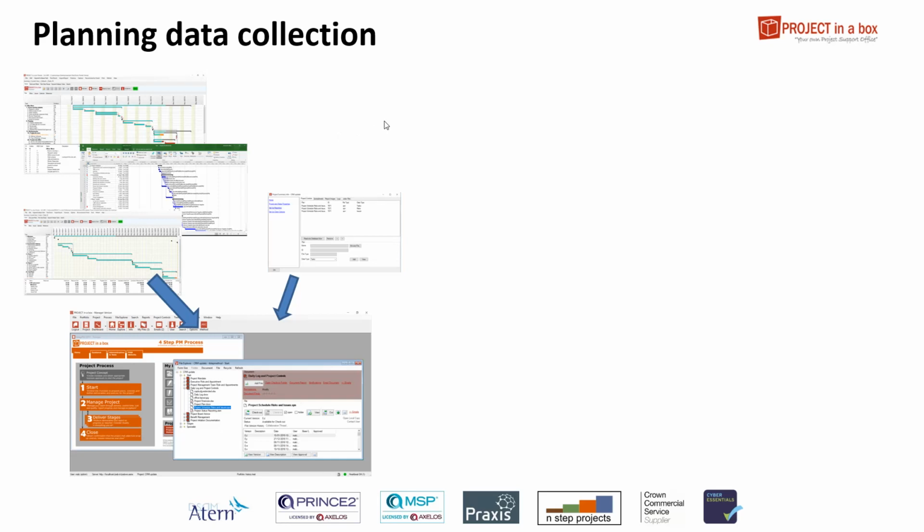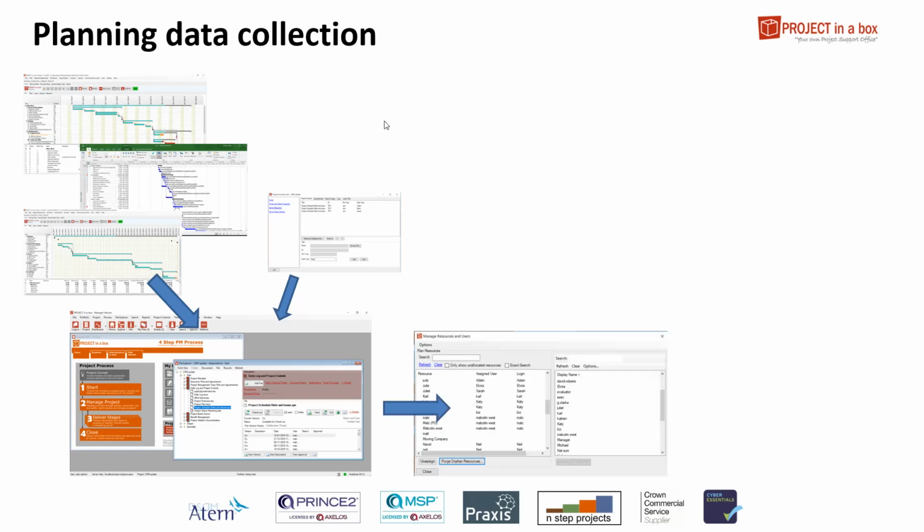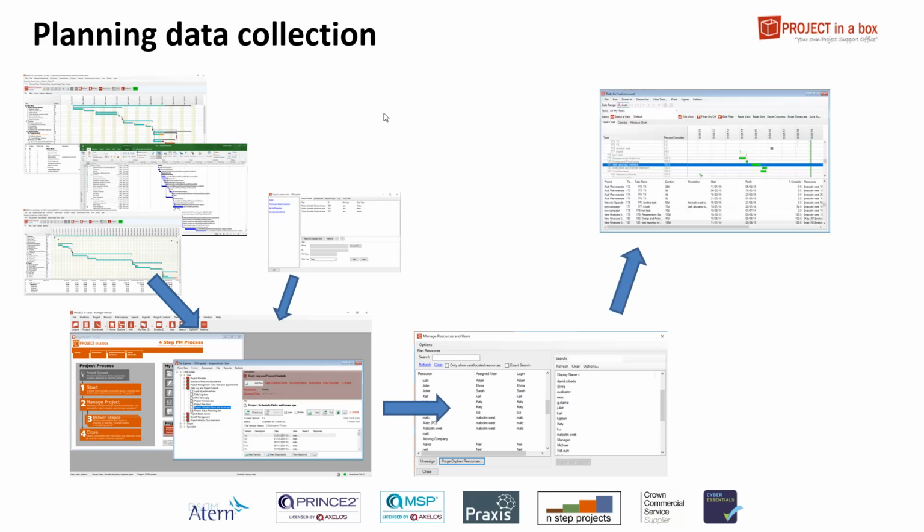So we have a central data store which has every task from every project across the entire system. We do a sort of lookup on that data to identify tasks with resource names against users in the system. So we have a lookup for managing that because it's very important to be able to give people that cut of the data, their own tasks, for example. And that data is then available for all sorts of different analysis.